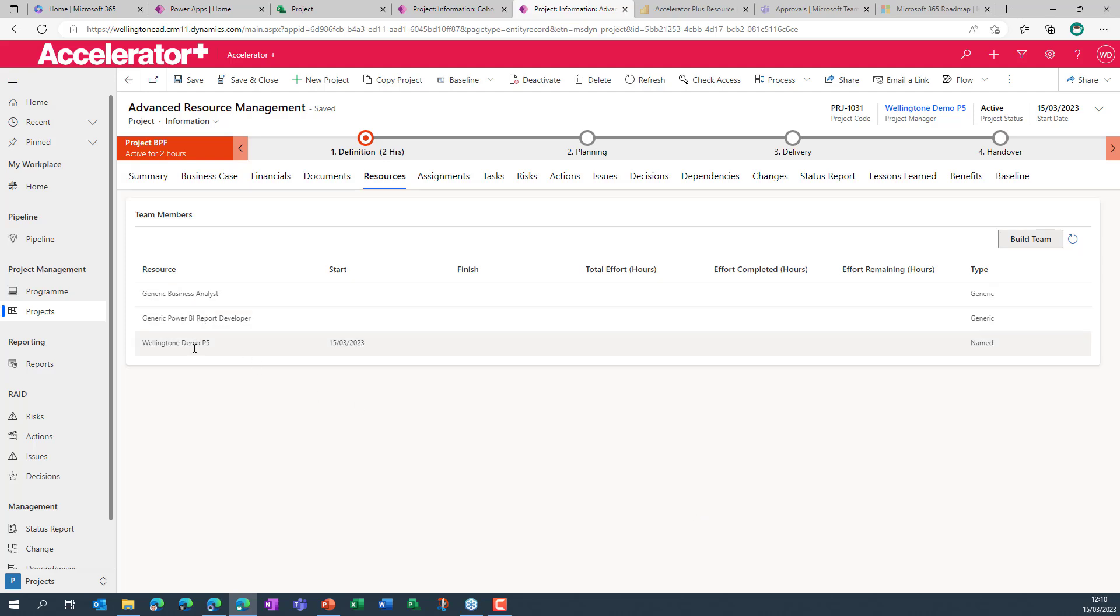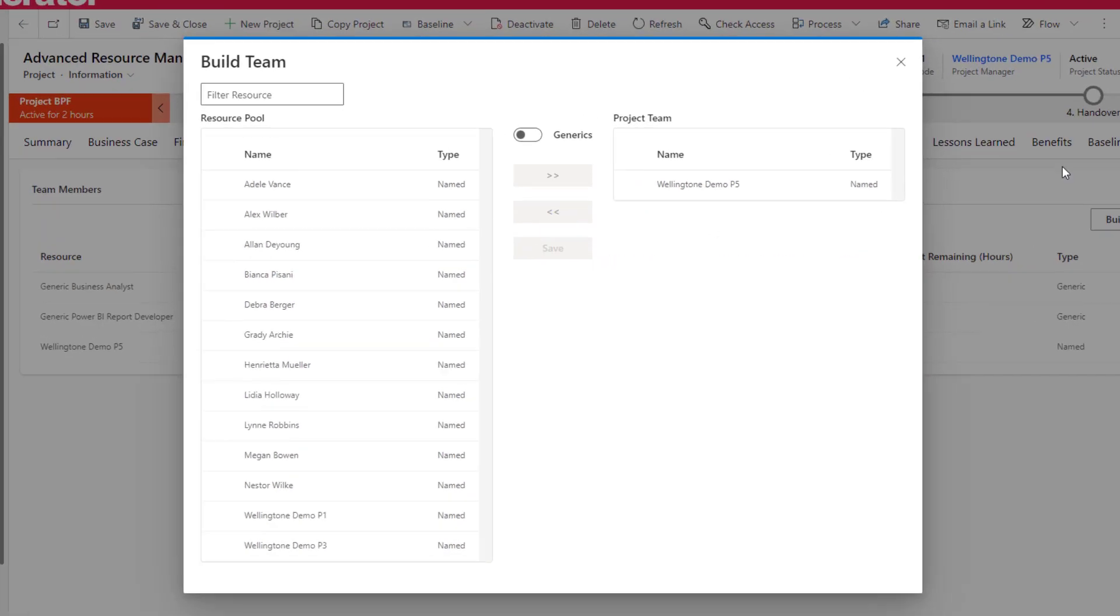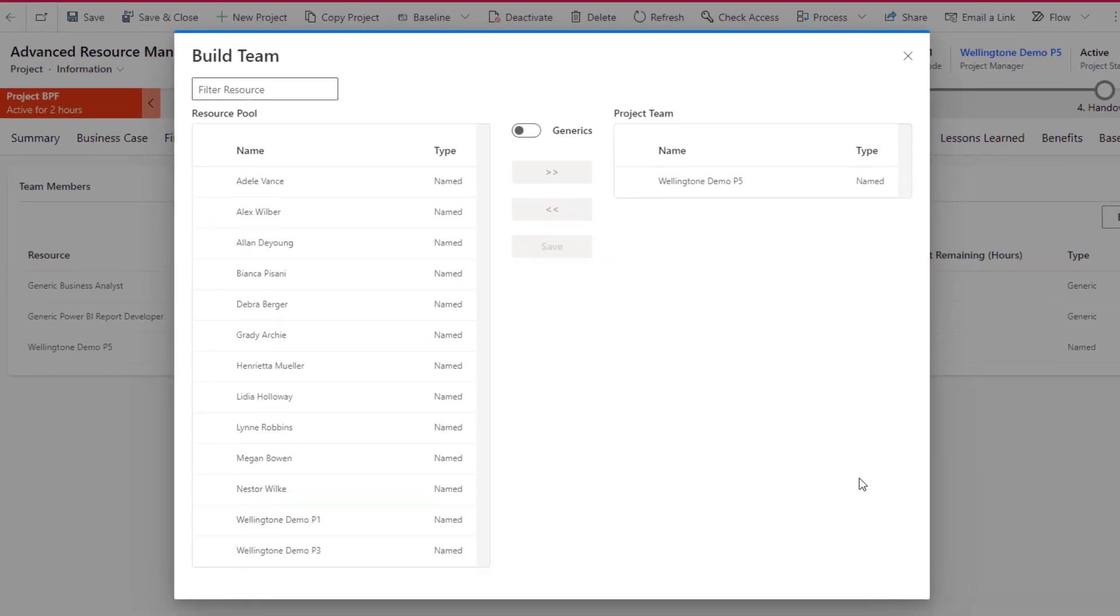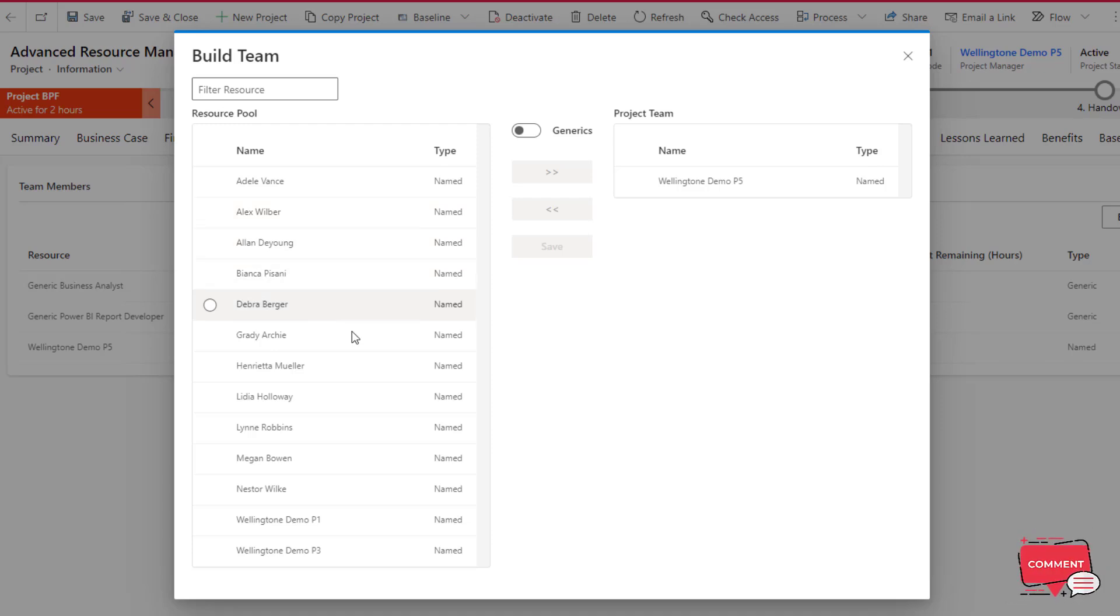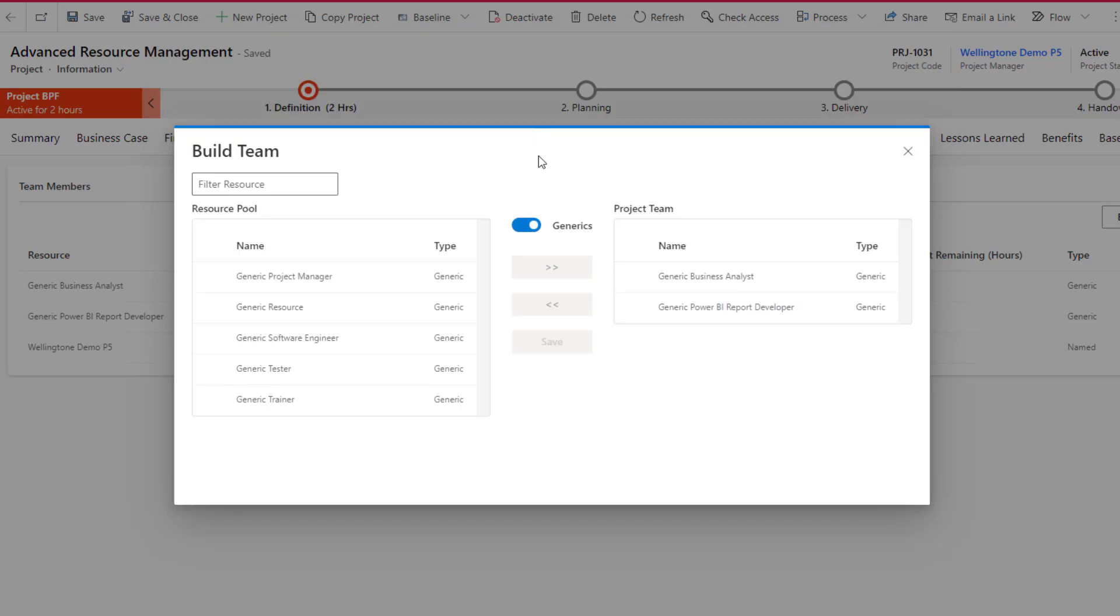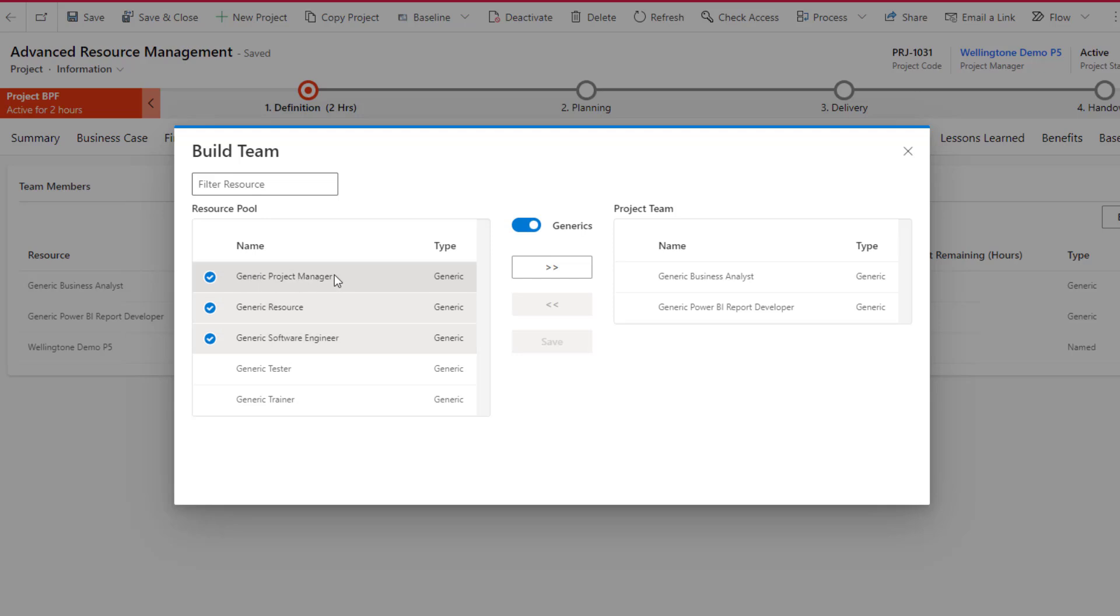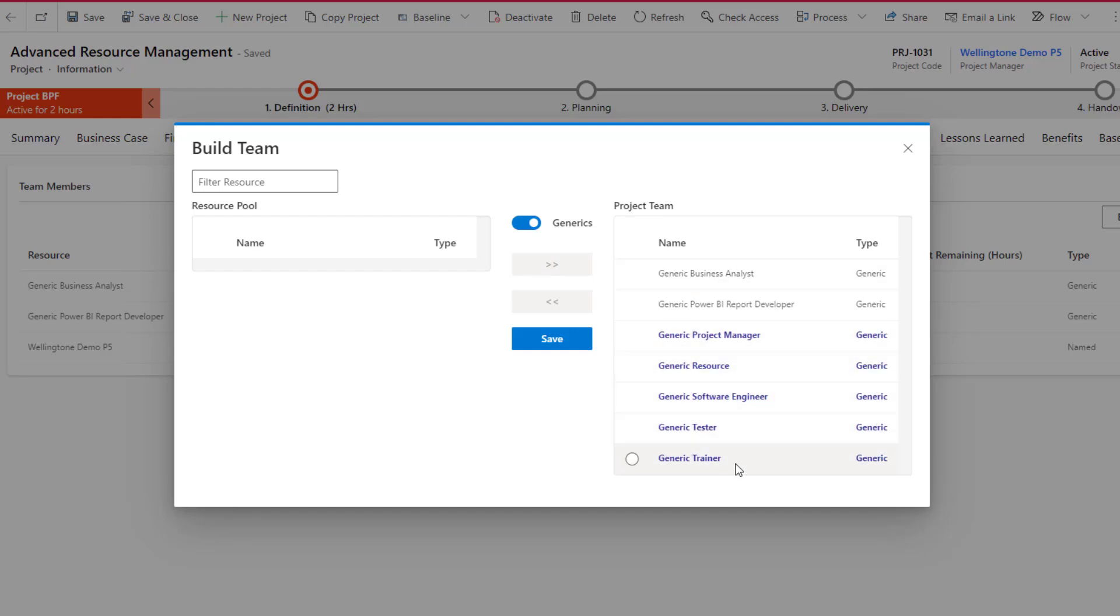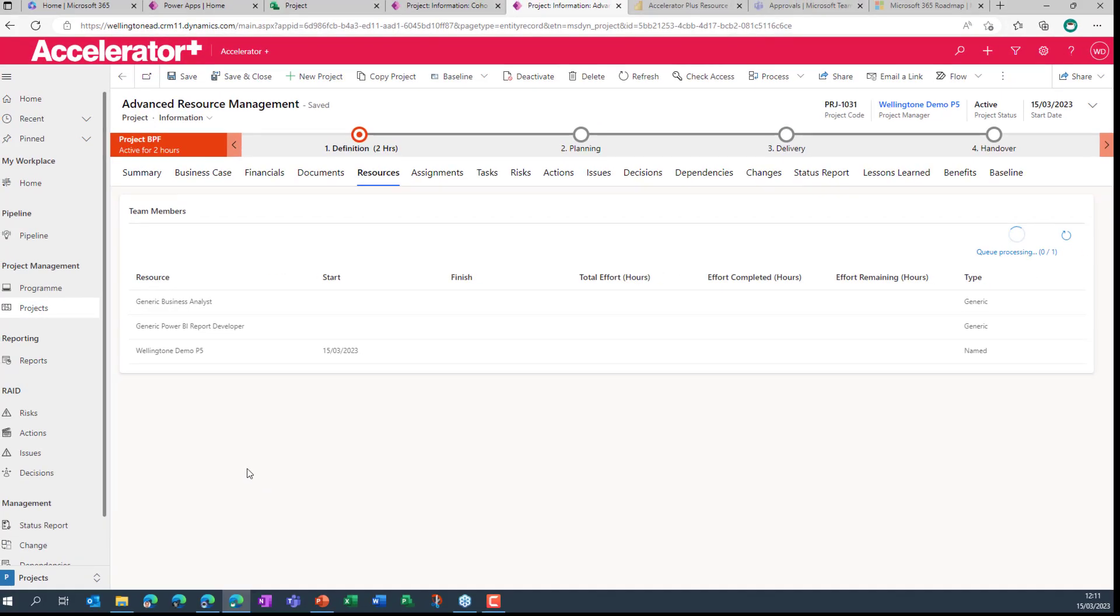Step number one for any project is really about going in and creating a team from scratch. You can see a couple of resource types that I've already added. But if I click on build team, that's going to present this window here in the central part of the screen. On the left hand side, what I see at the moment are a bunch of named resources across the organization. But of course, I'm interested at the beginning of the project's lifecycle in generics. I've already got two generic resources assigned. But what I'll do is I'll go in and select a few others. You might even argue that the project manager should have been the very first assignment, but it's not been. I'm going to go in and add every other generic resource that we have available. I'll add them to the team and I'll press save.